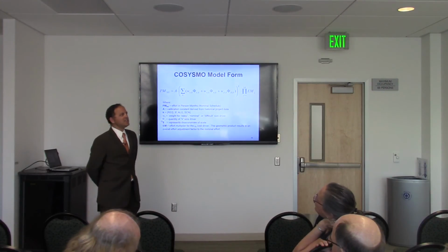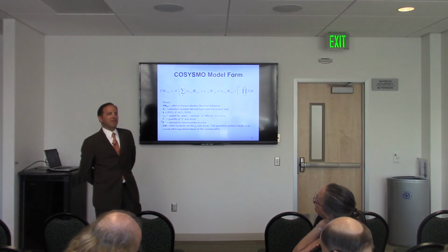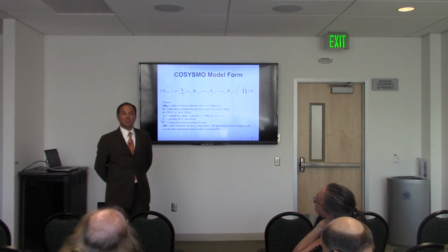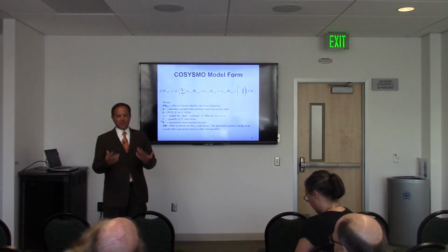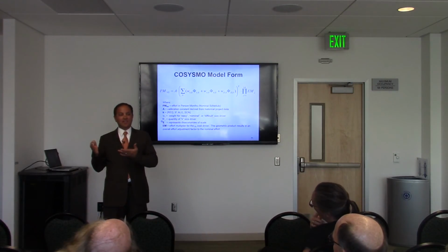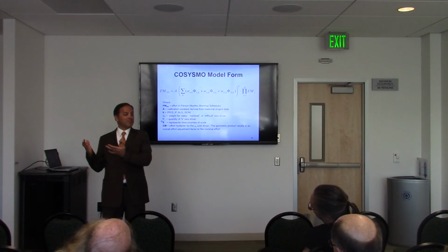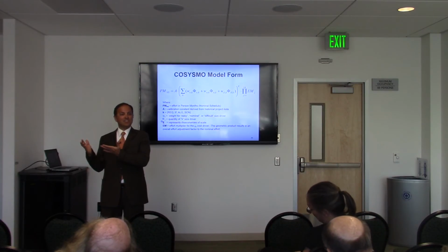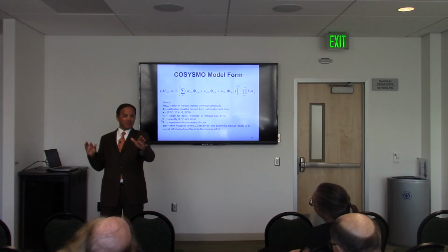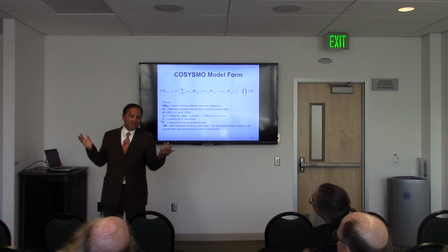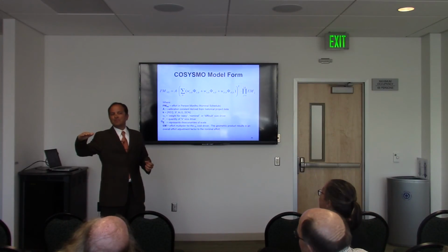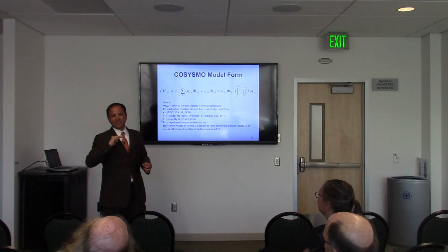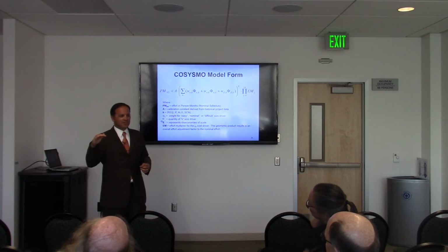Yeah, it's actually a problem that comes up very often, and it basically comes down to the legal aspect of the project. In other words, what kind of contract are you being issued? So the most common type of contract, like almost every research contract, is firm fixed price. That has certain legal implications, meaning that if you go over, that's your problem. If you go under, good for you. But I'm not giving you any more money than this firm fixed price, right? So who bears the risk on a firm fixed price contract? You do, the PI, or the contractor. The client bears no risk.